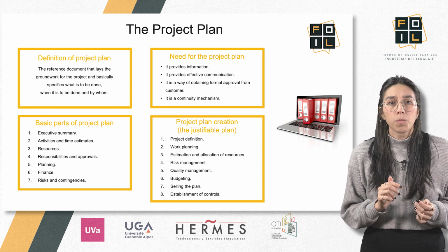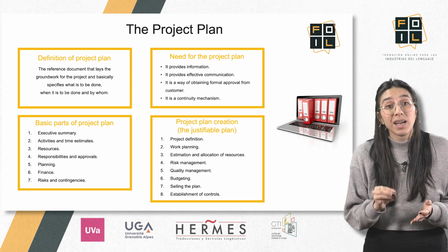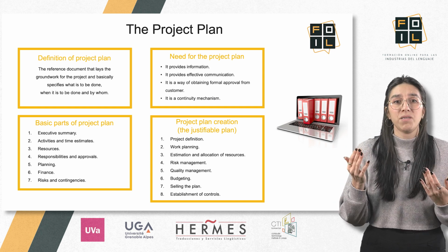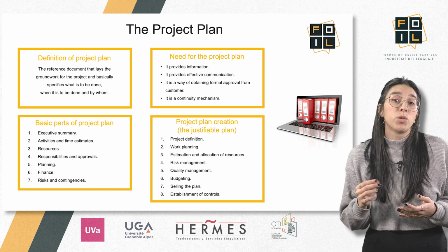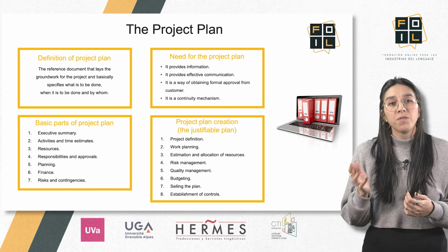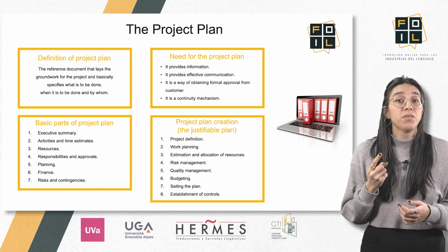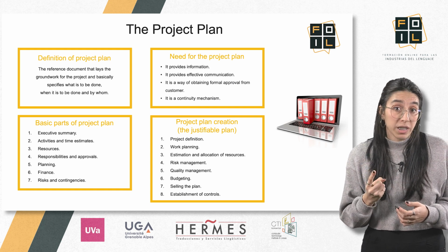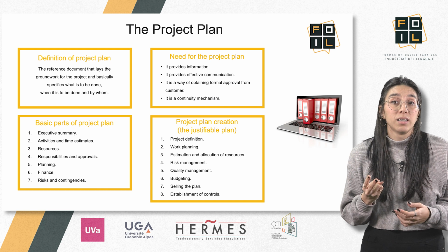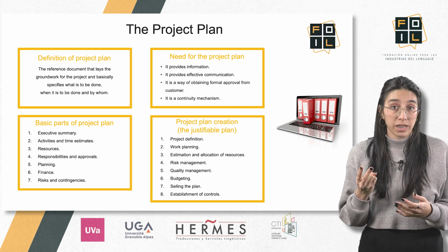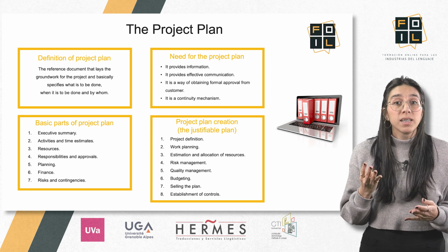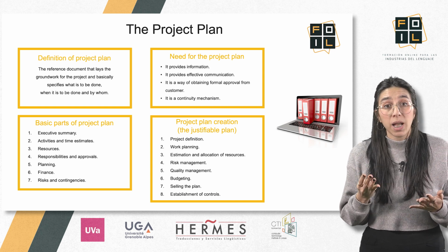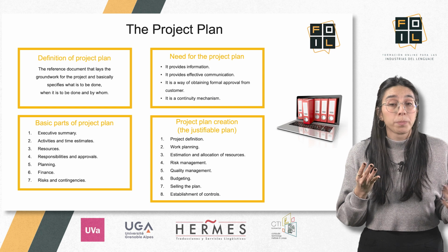O'Connell does exactly that and considers that, at the highest level, there are four aspects that need to be checked when assessing a project plan, namely the following: a clear definition of the project objective, the existence of a plan to achieve the objective, the presence of a project leader, the existence of some kind of auxiliary plan that leaves room for maneuver.